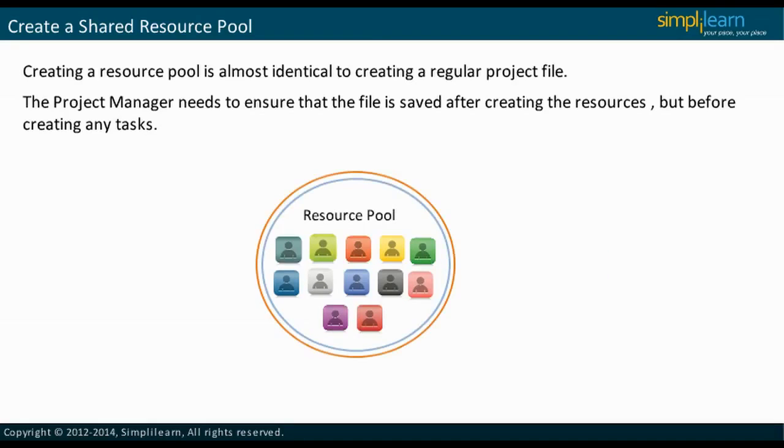Once created, the resource pool can be opened as a read-only file if the project manager wants to view resource information, yet allow others to make changes to the pool. The resource pool can also be opened with a read-write file if the project manager wants to update resource data. The change will be reflected in other projects. Let us learn to create a shared resource pool through a demo in the next slide.